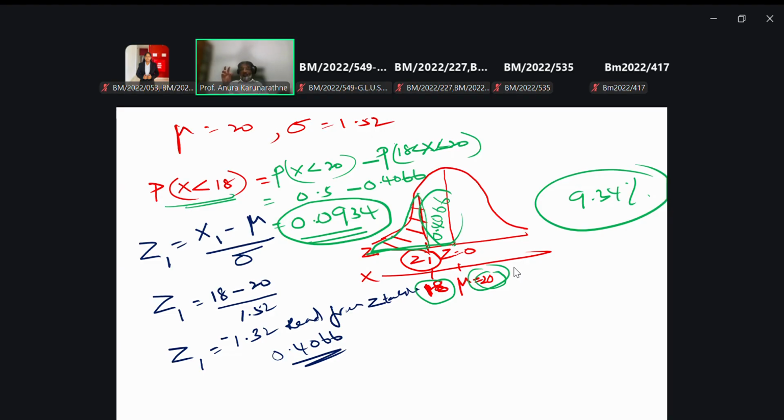So we can estimate time for each activity under the three or more scenarios, and ultimately we can go for the network and we can determine the critical path. Based on the critical path, you can determine the expected time for that particular project, right? Then we can mark the variance and standard deviation for each activity.